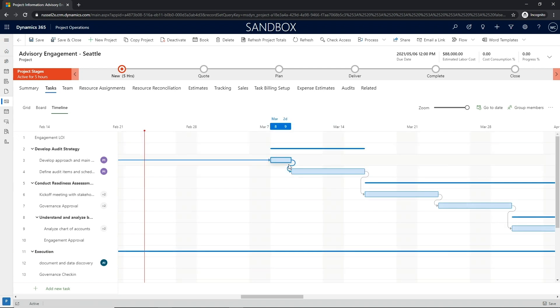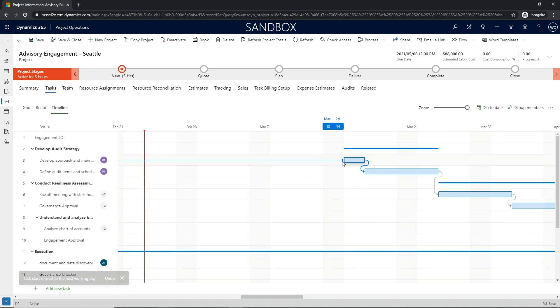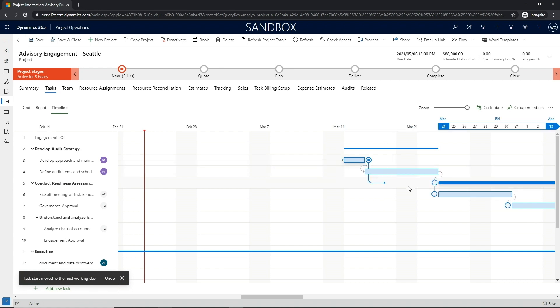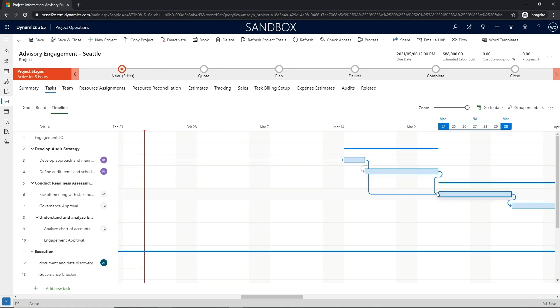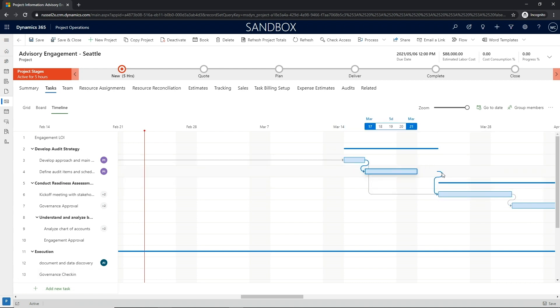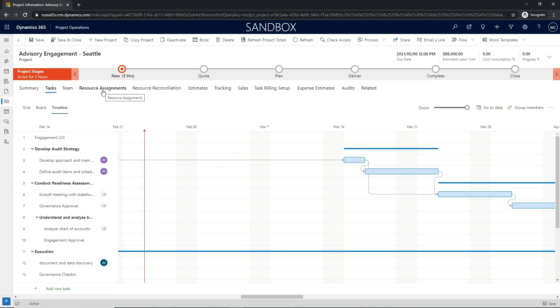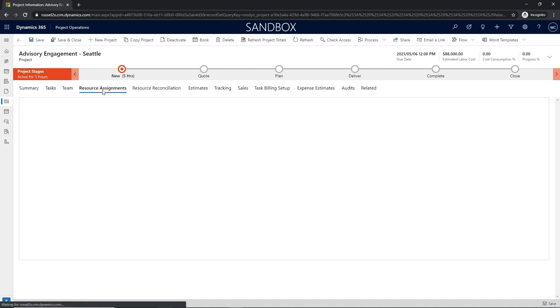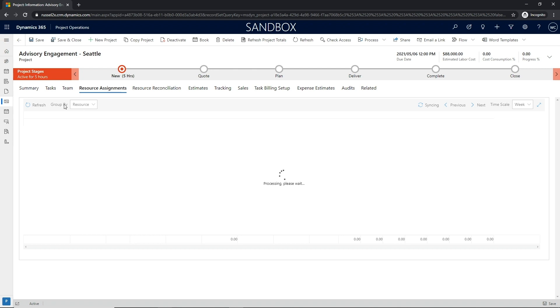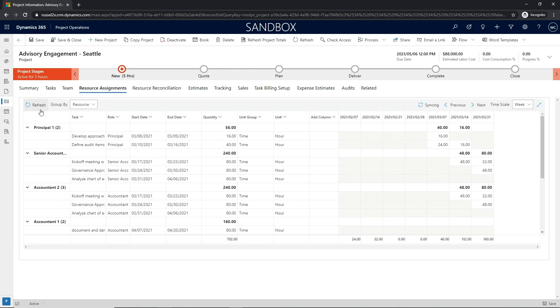With the timeline view, project managers gain a visual representation of the work breakdown structure at varying timescales. The timeline view provides editing capabilities allowing a project manager to define relationships between tasks, along with changing start dates and end dates of each task in the work breakdown structure.